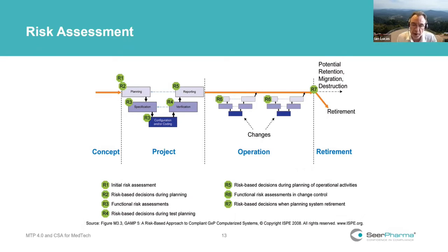And earlier, you may have seen some slides on the cost of computer system failures. If you find the fault in the first phase, it's $1. If you find it in the second phase, it's $3. If you find it in the third phase, it's $9. It's like a 3 every time it's going up. If you find it out in production, it's some huge cost to bring the system back.